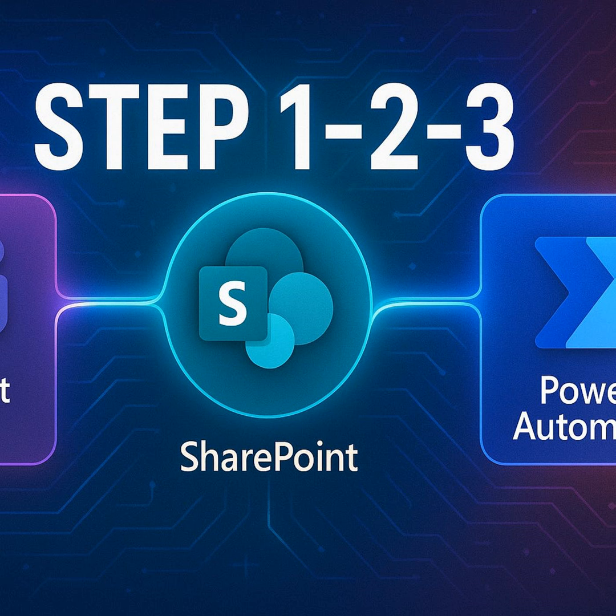So what does a valuable workflow actually look like? Picture a document going through approval in SharePoint. As soon as the status changes, a trigger posts an update into the Teams channel saying the document is approved and ready for use. At the same time, the project status field in SharePoint updates automatically to reflect the milestone.